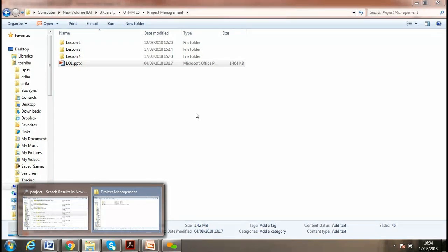Of course, we can come up with some backup plans, like backup power. So if the risk is high, we will address it by using a transformer or backup electricity. To address it, we can't 100% eliminate it. Maybe the battery doesn't work, or storage or charges fail, but still we'll keep a margin. If we are saying we'll deliver you the goods within 40 days, maybe we'll say we'll deliver in 50 days. So we'll keep a margin of 10 days.